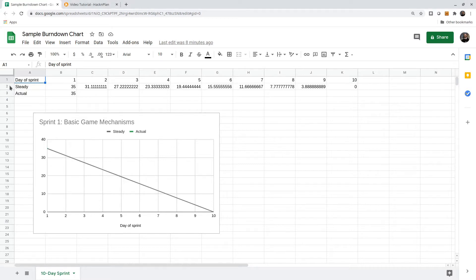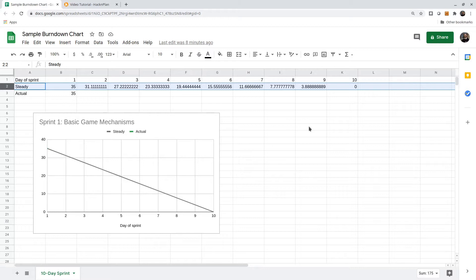This row of data gives a steady line, so if the team is working at a steady pace, we should see progress like this.